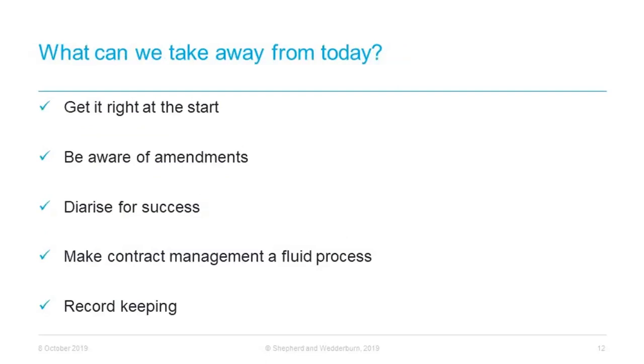Firstly, it is absolutely imperative to get the contract right at the drafting and execution stage. For instance, in NEC contracts, it is essential that the contract data is filled out fully and accurately with the appropriate W, X and Y options being selected. Similarly, in GCT contracts, the intention of the IVD is to harmonise payments throughout the contractual chain, but this can only work in practice if it is used across all tiers of the project.